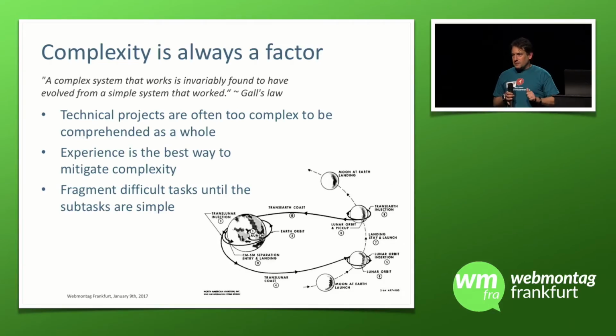Now we're getting a little bit away from the difficulties into the methodology of estimation. One thing that we need to look at is not necessarily the amount of time, the amount of effort, the amount of jobs to be done during programming, but the amount of complexity that we have to overcome. That is the most important part of estimation. Anybody who's ever tried to estimate a job knows that if we can break down complex tasks into simple tasks, we can use our experience to put an accurate dollar, time, and effort value on any one job we do.